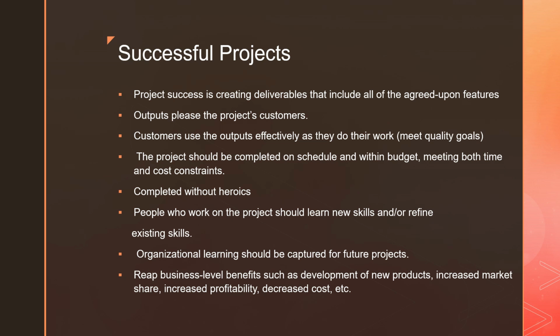For example, we can have two types of constraints in resources, namely an adequacy challenge and an availability challenge. For example, you want 100 people but you have only 50 people. That is called an adequacy challenge. But you have 120 people but you don't have them available when needed. That is called an availability challenge. Availability challenge results in compromises on requirements.